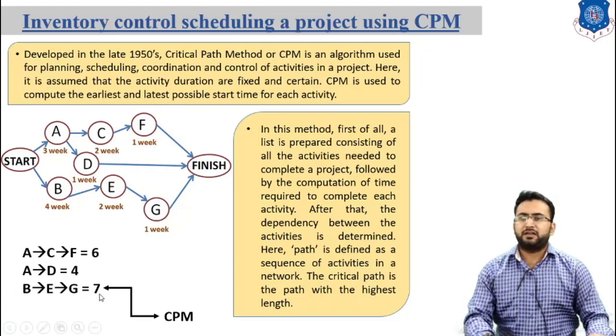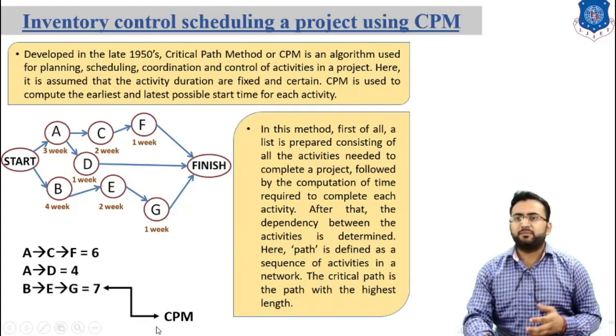So this path takes the maximum time among these 3 paths. This path is known as the critical path because it takes the maximum time for completion of the project.